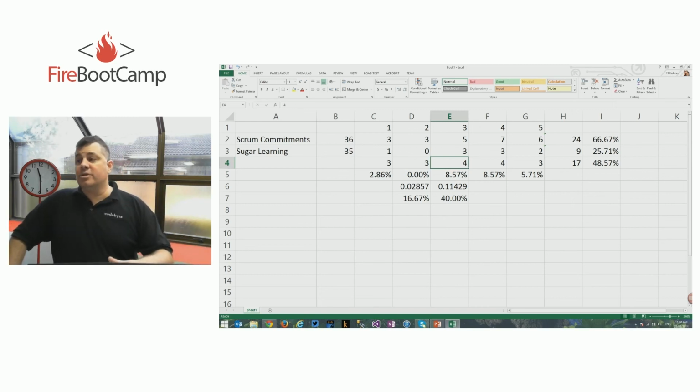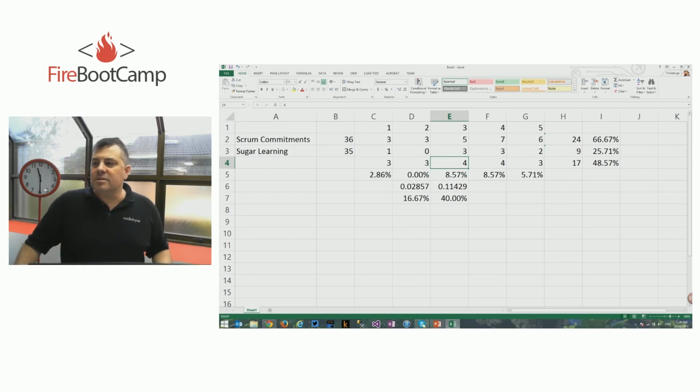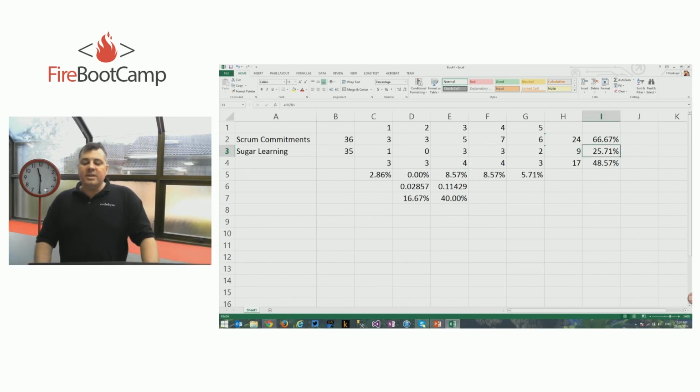Even if you lose money on this project as a company, at least for the next one, you know what your capabilities are, and you can say, okay, we need to negotiate. Maybe this shouldn't be 9 weeks, this should have been 18. I know this is an exercise you guys are doing, but I'm talking about how it can relate to the real world. Make sense? It just makes it easier when you have those numbers to analyze where you have been and where you're going. After 5 weeks, we completed 25%. Are we in danger of being late or not delivering the final product? I'd say very much so at this rate.